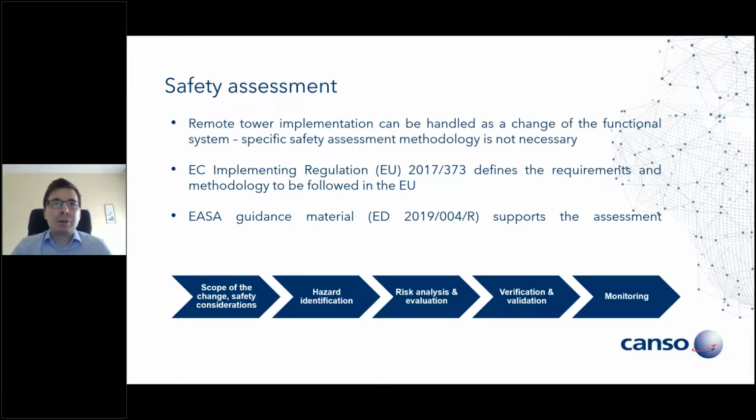Although the remote tower implementation project is quite complex, no specific safety assessment methodology is needed for the safety assessment of remote tower projects. Here in Europe, we are using the methodology provided by Regulation 373, but all ANSPs can use their own safety assessment methodology, of course, which is compliant with the ICAO regulations and the local regulations.